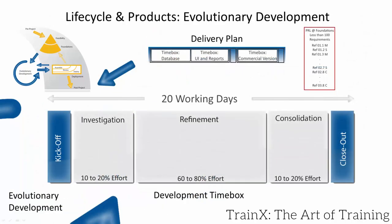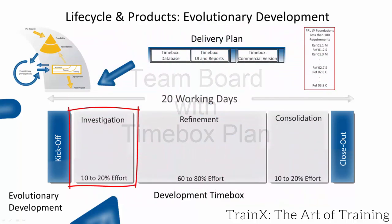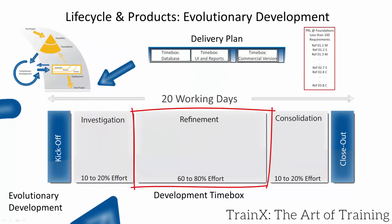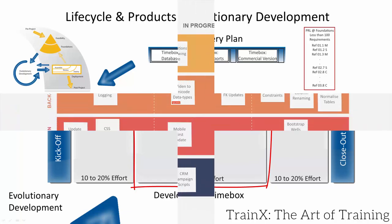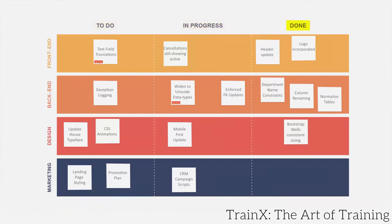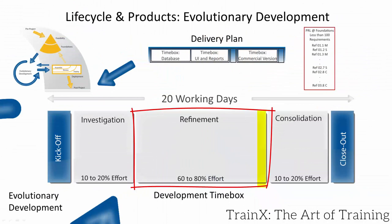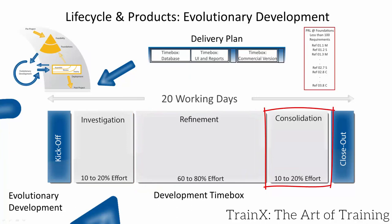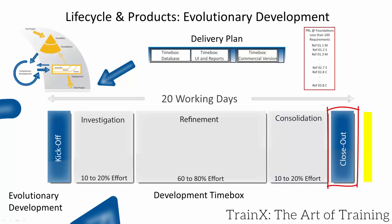Here we revisit timeboxing with further detail. After kick-off comes investigation, where the timebox plan is created and typically recorded on a whiteboard called the team board. The plan shows allocated resources with a sequence of activities. The investigation review takes place to inform development during refinement. In refinement, the main development work is done, driven by MoSCoW priority and practicality. Some teams will use Kanban — a system of indicating work to be done, work in progress and work completed. Easily visible whiteboards are sometimes referred to as information radiators or big visible charts. The refinement review informs consolidation, where loose ends are tied up so deliverables meet acceptance criteria. No new work is begun here even for a remaining must.